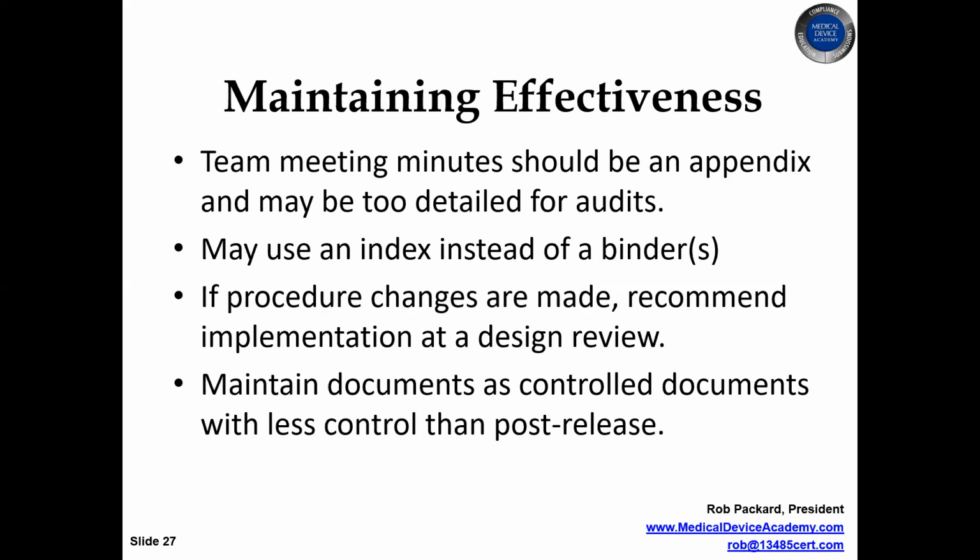Don't have 40 different people approve every single change during the design process. The product's not on the market. So if the product's not on the market yet, don't have everybody approve it. The simplest would be just have the author of the change and the project lead approve it.